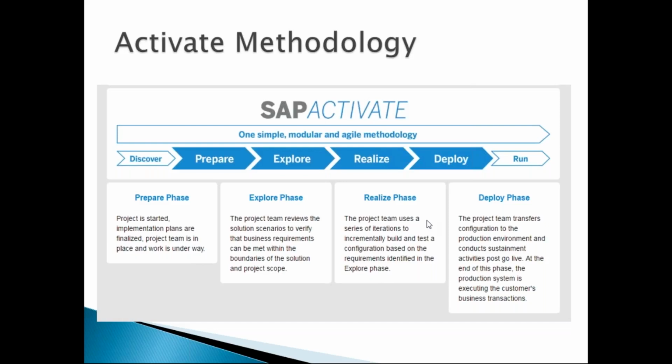So now when the customer is starting with success factors, all their existing old data, their existing employee database, which is in the previous HR system, we upload all of it into SF, and set up the permissioning. All that is what we call the production cutover activities. All those activities before we make the system live, we perform in the deploy phase. So preparing the main live system, or the production system, is what we call the deploy phase. At the end of that deploy phase is where we announce the go live of the product and the customer will start using the system in real time.